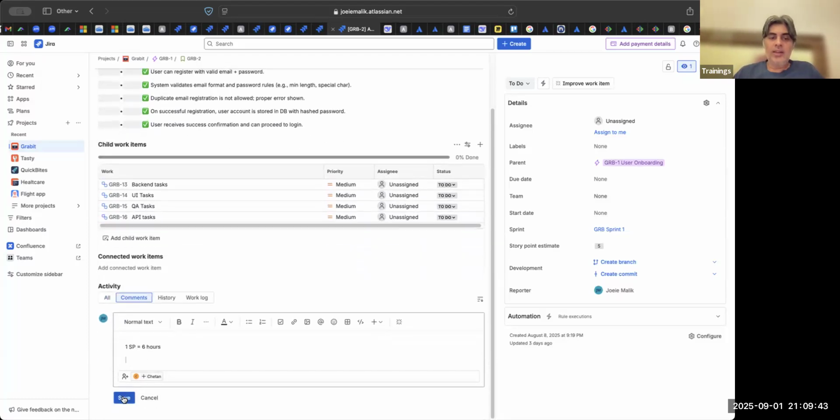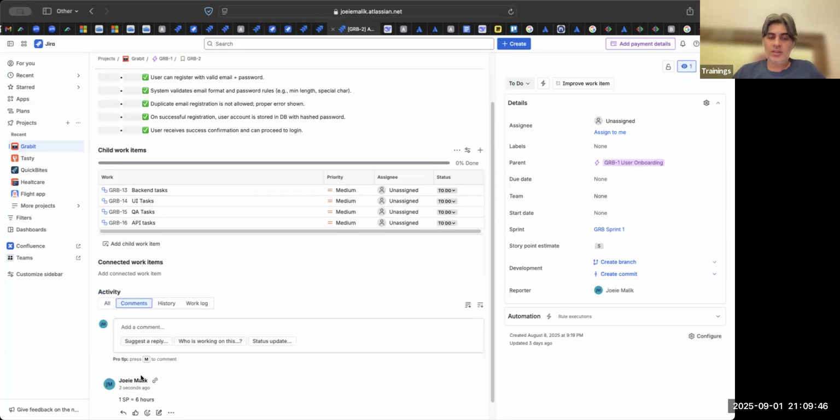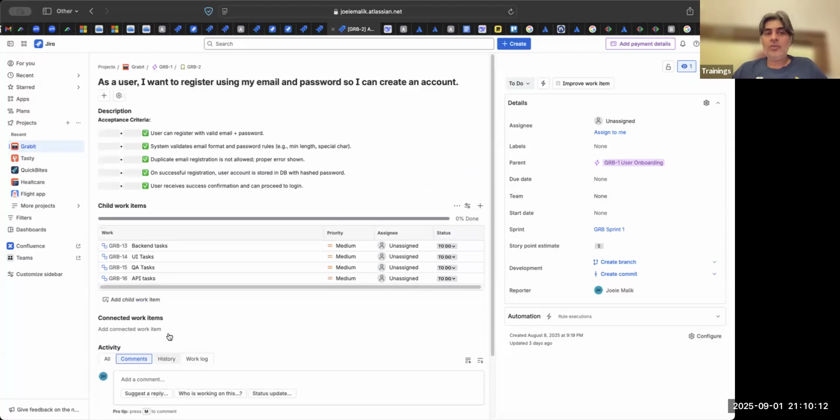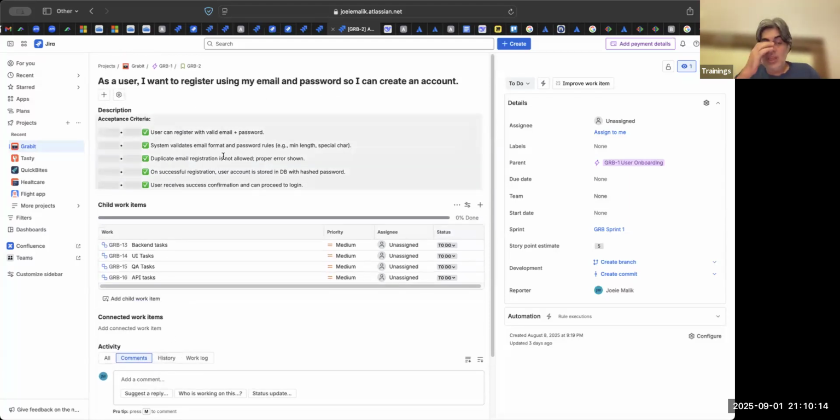Okay. This could be 5 hours, this could be 7 hours, but typically 6 hours working days there, 1 hour of breaks and all, 1 hour of delays or meetings or whatever else you want to do. So productively, one story point is 6 hours. So if you say you have completed one story point of work, which means you have completed 6 hours of work.